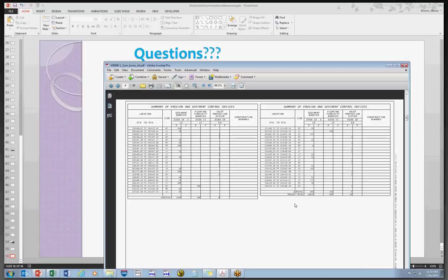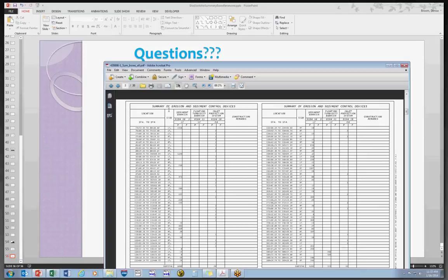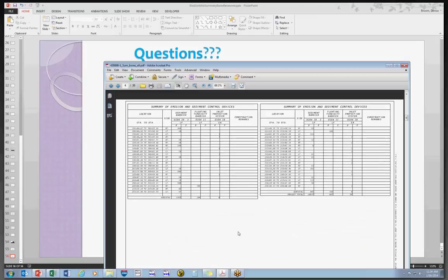We don't want to see them at the end. It needs to be at the beginning. When I first see a summary box, I can get those grand totals there. It makes it easier for everyone involved when it's the one at the front. As far as the templates go, it's already set up that way, so it's not a hard thing to leave it like it is, rather than get multiple worksheets to add them together.